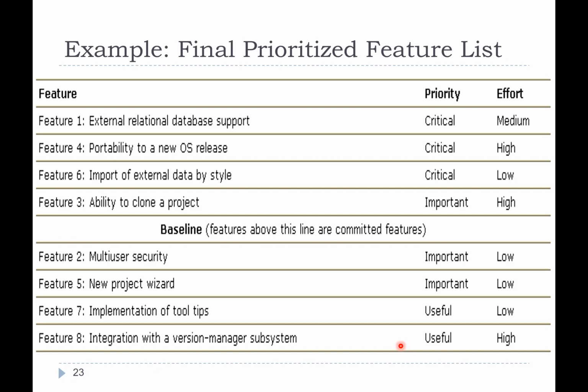In reality, a proper development process would require that there is an official channel to submit what we call change requests. Adding is a change. That gets reviewed by a team, who decide the impact of that change, if we can actually do the change or not. And if it gets approved, then sure, we can go ahead with it. But a lot of times you get a shortcut into this requirements leakage, the scope leakage, and then this starts to move around. It took us a lot of effort just to put that baseline over here, and if I start to play around with that list in an informal way, then it might blow up in my face at the end.